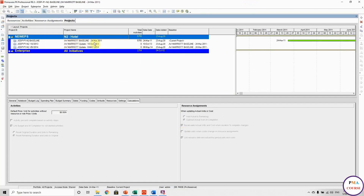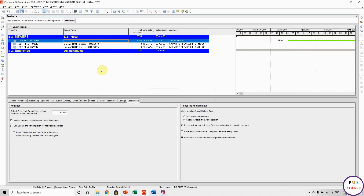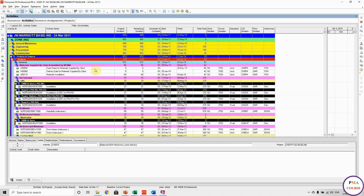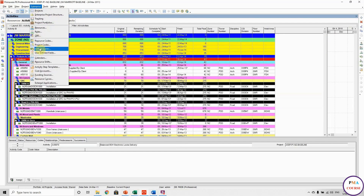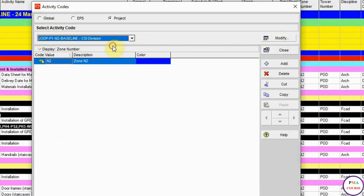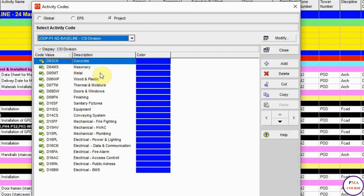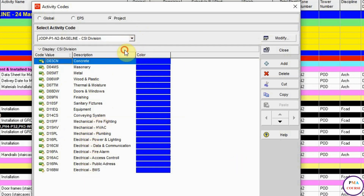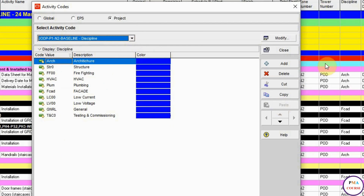I have three programs: the baseline and two updates — one from October 2013 and one from May 2014. Opening the baseline, I want to show you the activity codes. These are the codes used: CSI division — concrete, masonry, metal, wooden, plastic, thermal, finishing, sanitary, mechanical, electrical, all types of electrical. For discipline, we have architectural, structural, fire fighting, HVAC, plumbing, facades, low current, low voltage.